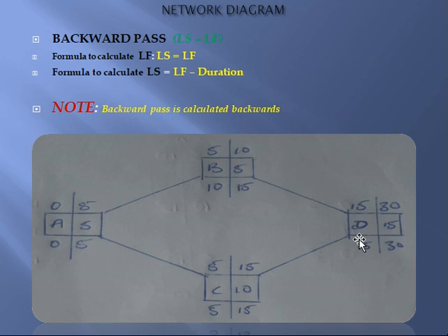So that you can carry out the whole activity here in 15 days and round up in 13 days. So the latest you can start this project is on the 15th. You understand? So you simply bring down this 15 of the early start down here for the late start. You understand? Now remember, we are calculating backwards. So from the diagram, activity D is dependent on B and C, like we already know.